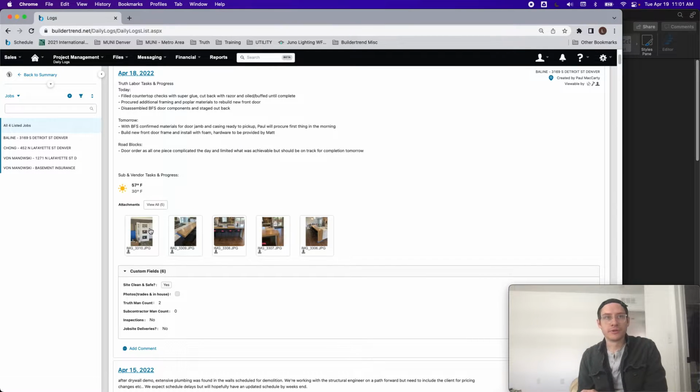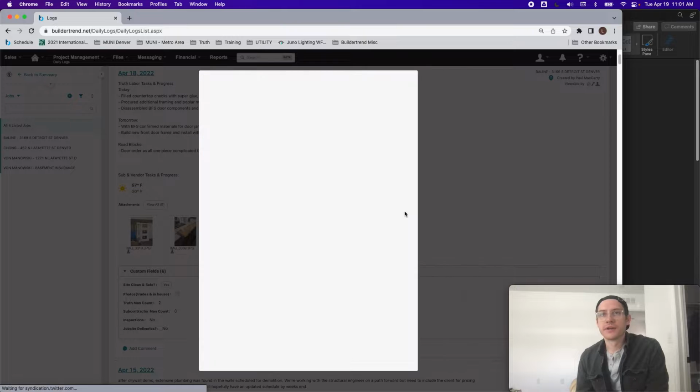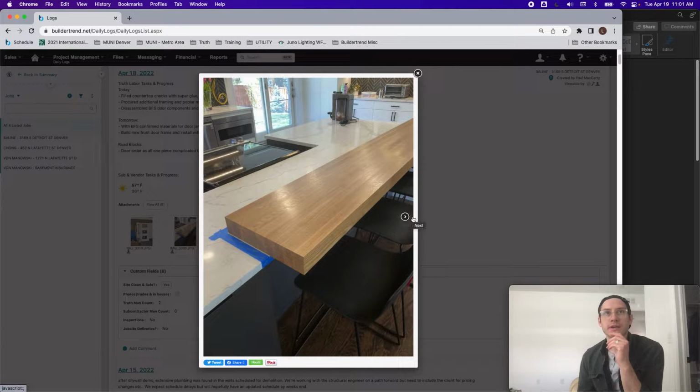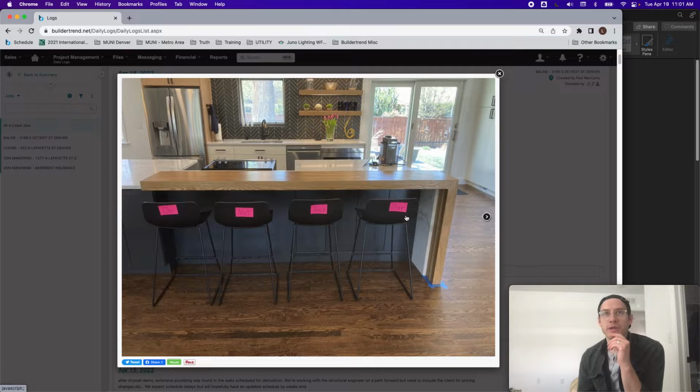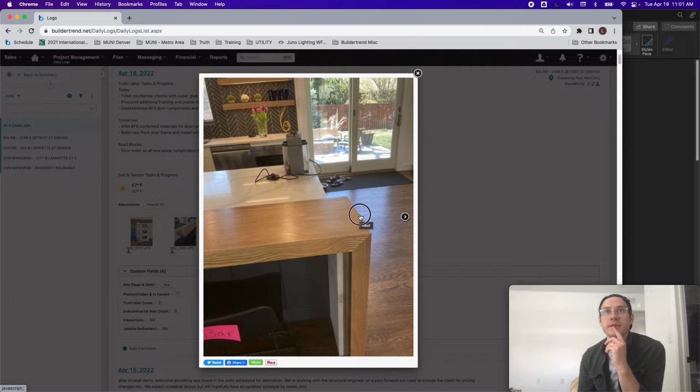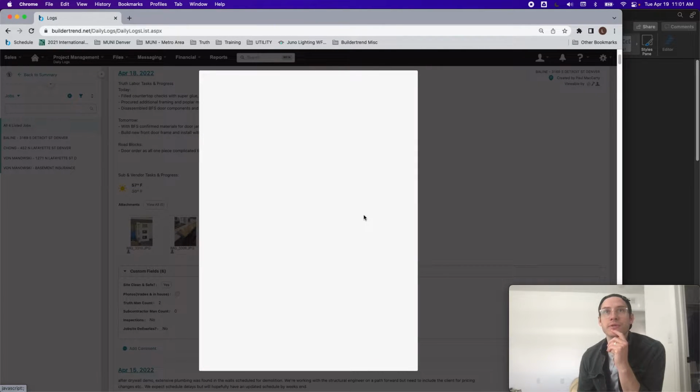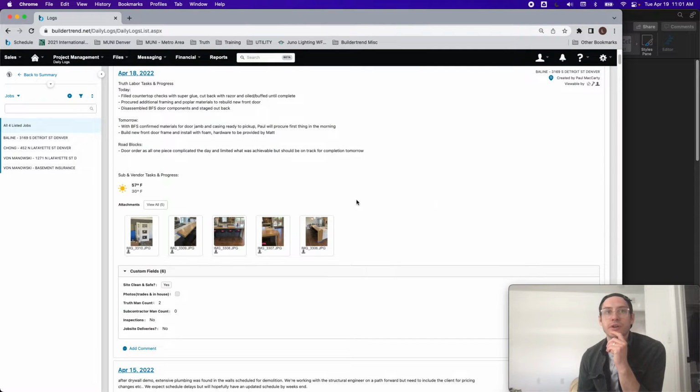Okay, and then I'll do a quick run-through of the photos. We ask our guys to take big picture photos because often the things we need may not actually be the focus. In this case, the focus is the bar, but maybe there's a light switch, or some plug mold that's missing here. Lots of times the context of the photos is actually more helpful than the intent of the photo, which was just this butcher block countertop. Maybe other photos are helpful for other subcontractors. So keep that in mind as you review the photos. You can also look for context cues for other things.